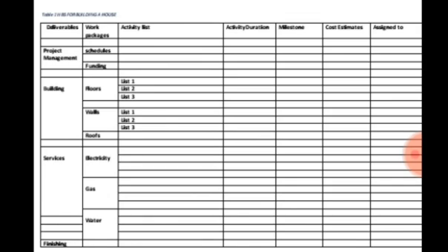Now, we said for the first activity, you know the amount. The second activity, you know how much it is. Now, if you add all the cost of the various activities together, you are going to be getting the total cost of the entire project. You understand? So that's one thing the WBS also does for you as well. It helps you to be able to know the total cost of the entire project.